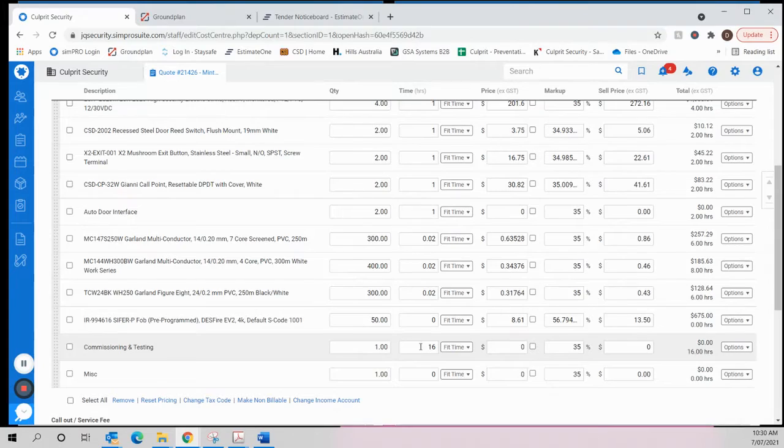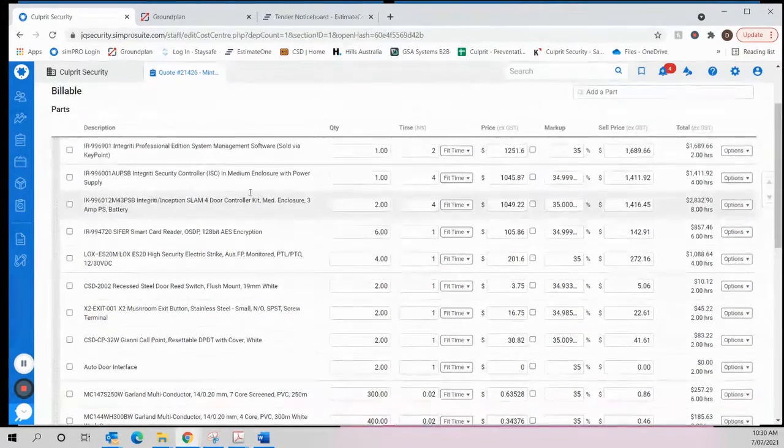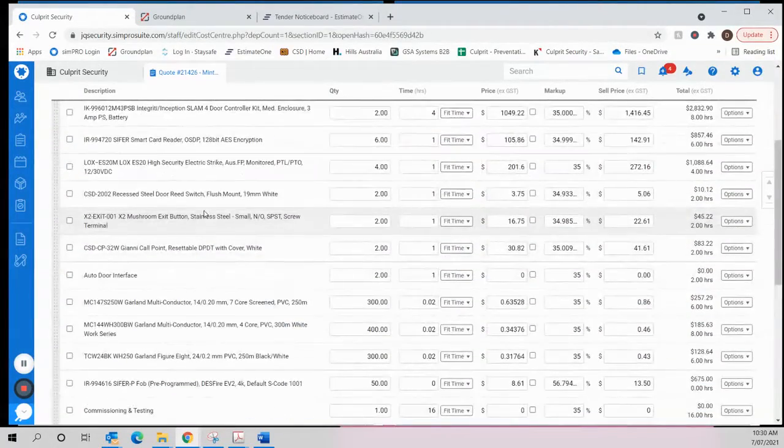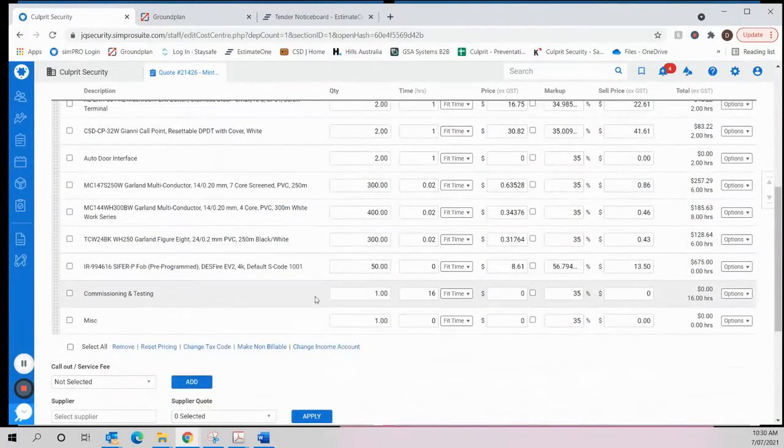And that, as I said, is up to about the 16 door mark. We can normally work on the limit of that 16 door mark inside of that 16 hours. As we go over that point, we start to ramp up the hours, and I'll go through and set up some takeoff templates based on that, so that you're not having to guess. It's all laid out for you.